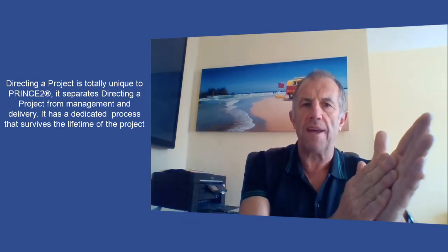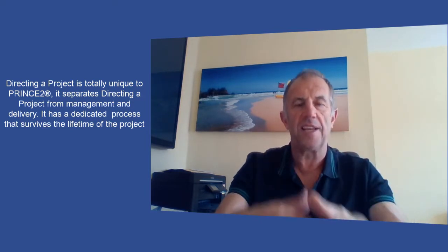Then what's really unique about PRINCE2 is this thing called the directing a project process, because it runs through the entire lifetime of the project, and it's where the big hitters are sat giving decisions to the project manager. So it's really unusual. Most project methods that we've looked at don't separate directing from managing. It's all in a sequence of things, but this one lives above it. So you need to take time to think out what the implications of that are, because they're giving authority, dealing with exceptions, and giving approvals. It's definitely unique to PRINCE2, that idea.